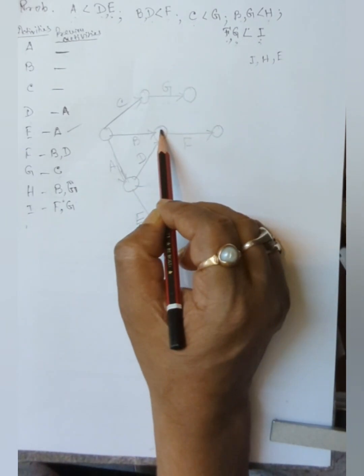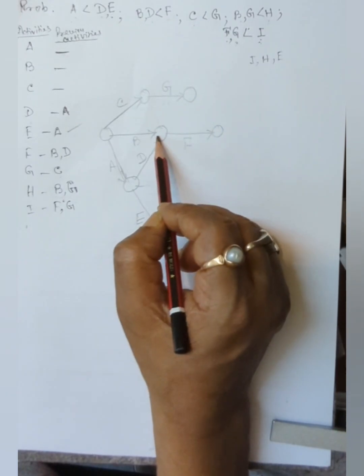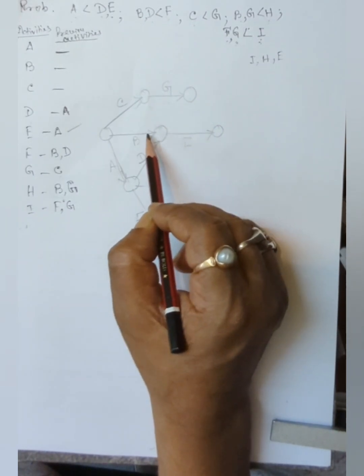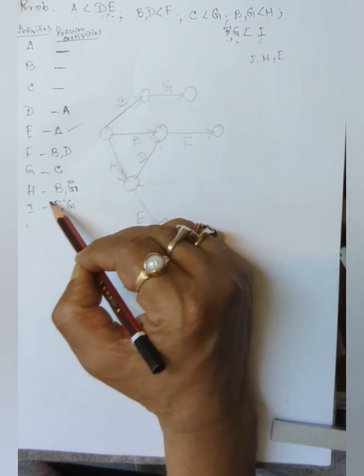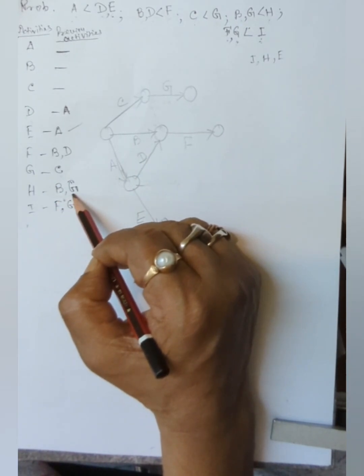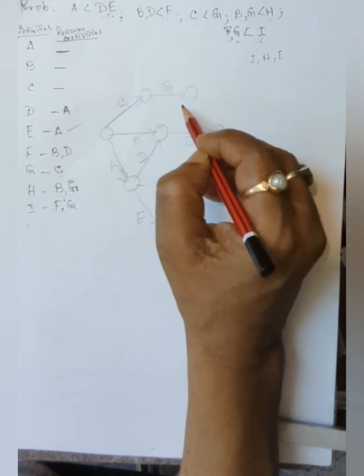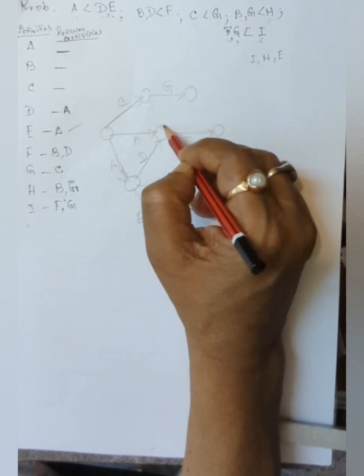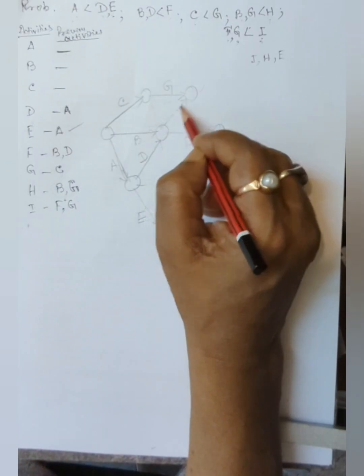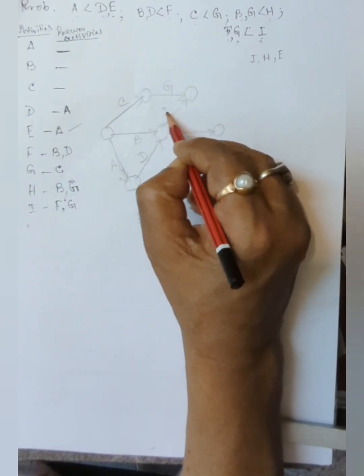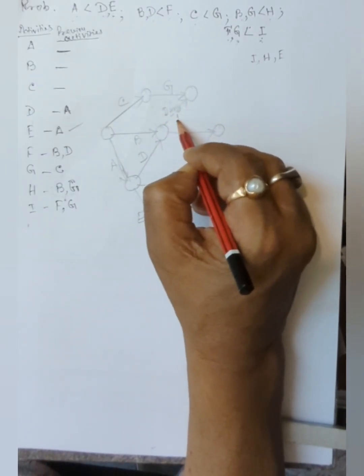You cannot merge this here. If you draw it here, then what will happen? B and G, but D will also be included. But here the condition is only B and G are the previous activities. That's why, this is B and this is G. Here a dummy will be used, for B and G, to show the perfect relationship. Say this is dummy 1.